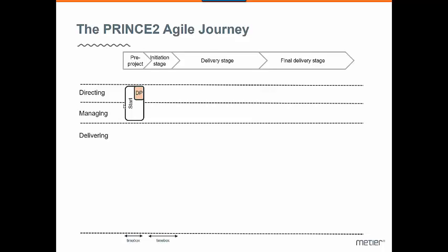Perfect. But it could also be that you're looking at starting up a project separately, and while you're doing that or afterwards, you're then finding a time slot for this project depending on its priority relevant to other possible projects you have in your organization, and what the teams are doing, right? And then you assign it a time slot, and when you do that, you've already done starting up a project, so you're going to kick off with the initiation stage when it's time for it. So like, okay, we don't have the team available right now, but you can go in January, but you can go 1st of May. That's when your project starts with the initiation stage.